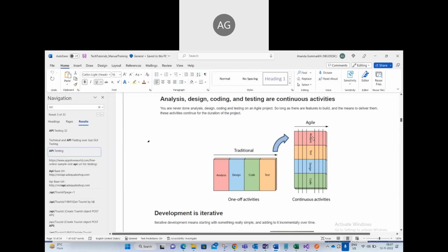Other user stories, again I can do the analysis. So the work can happen parallelly. So continuously work will happen. All these phases. We won't be in one particular phase in Agile. Understand? Every user story is different. The user story can be in analysis phase or can be in testing phase or can be in design phase or can be in development phase. Understand? Got it? So that is the difference between waterfall and Agile.